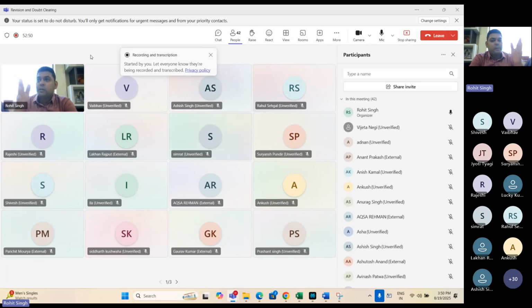Sprint review: once the sprint ends, then we do the sprint review. Whatever the sprint plan that we've defined and designed, were we on the right track? Whatever the sprint goal was, did we achieve it? What were all the challenges? What were all the issues? What contingency or impediments were there that need to be rectified and resolved? So that's a sprint review.